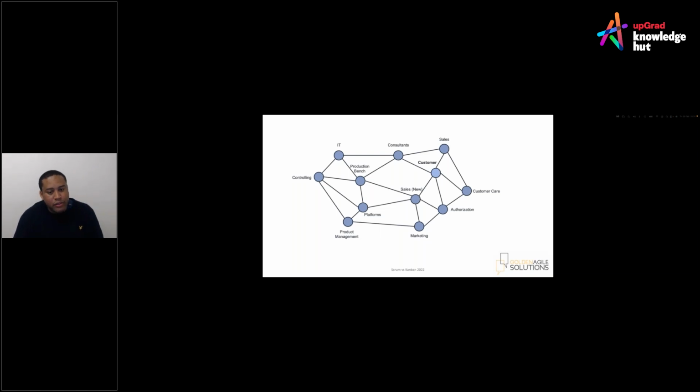But again, that is not saying that Kanban cannot be used in projects, but Scrum may give you a better roadmap when it comes to projects. So you can say we've got a sprint, we've got a product backlog of 100 items. We're going to work 10 items at a time. So that will be 10 sprints. And we're going to divide these items into our sprints. So you can say, well, this item will be expected by sprint 5, and sprint 5 will be on such a date. And that's where Scrum could be fantastic.